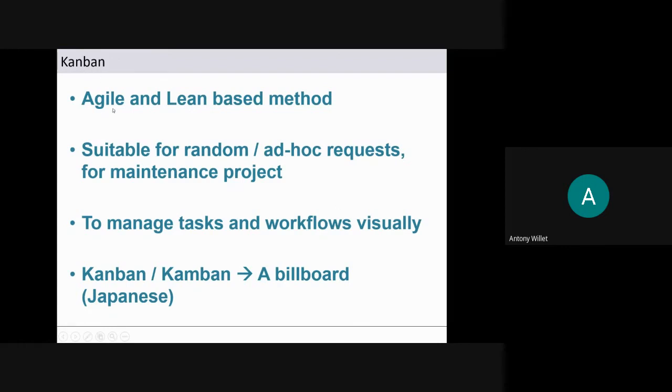Okay. So, an Agile and Lean-based method suitable for random ad hoc requests in maintenance projects. When the project is in the maintenance phase, one week we'll get one request, next week we'll get 5 requests, and another week we'll not get any request. So it is ad hoc, and in the maintenance phase that will be the style. Kanban is better for that.